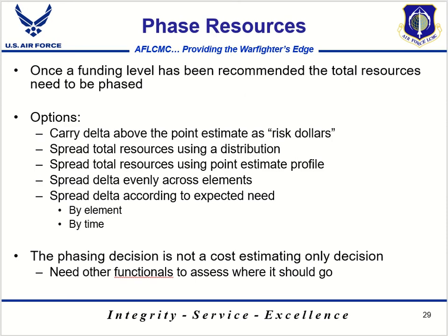Okay, now that we have our simulation complete, we believe our results make sense, and we've gone ahead and run some trade space analysis, we need to phase our risk dollars back into the program. There are multiple ways to do this, and some of them may be situation specific. Some of the options you have include carrying those risk dollars above the point estimate, almost like management reserve.